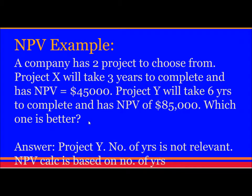NPV Example: A company has 2 projects. Project X will take 3 years to complete and has an NPV of $45,000. Project Y will take 6 years to complete and has an NPV of $85,000. Which is better? Project Y is better because in NPV analysis, the number of years is not the deciding factor — whichever project has the higher NPV is selected. Here, $85,000 is higher, so Project Y is better.